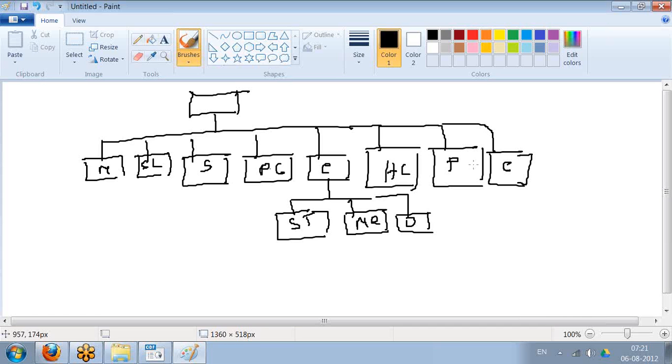But then for the project you will have to estimate all these things. If you want to set up a test lab, okay, you need time for it. You want to conduct a training program for your team, you need time and money for it. You want to go for a team outing, you need budget for it. Project reviews, weekly it's happening, okay, time for it. Goal setting, you need time for it. Recruitment, interview times and appointment, all those things, okay, it needs time.